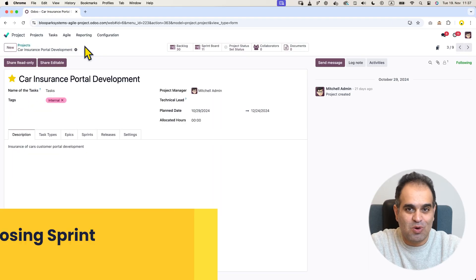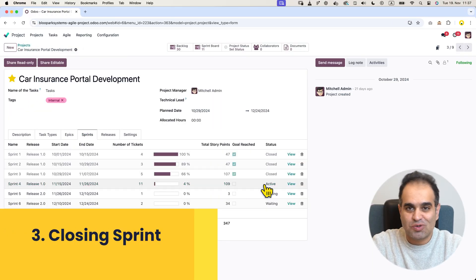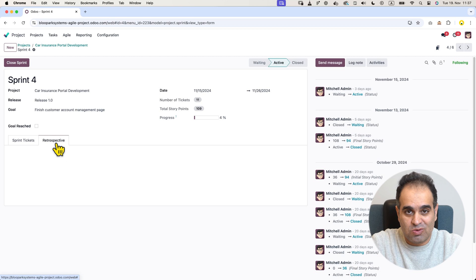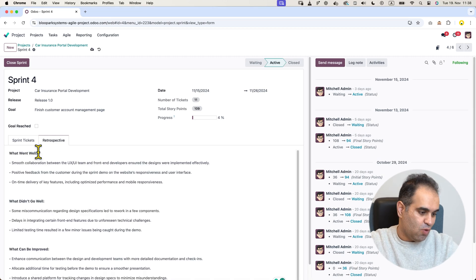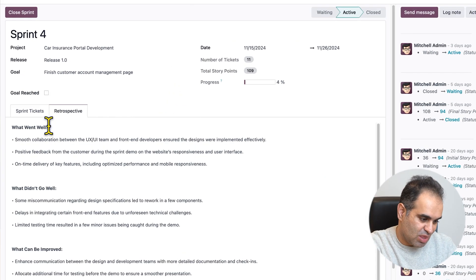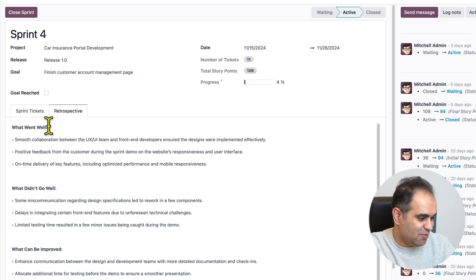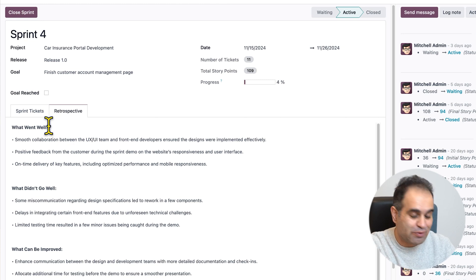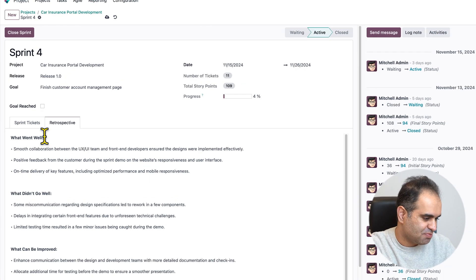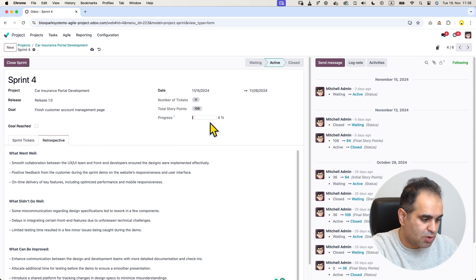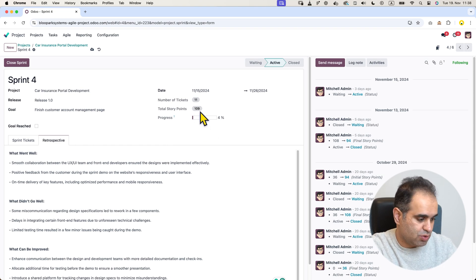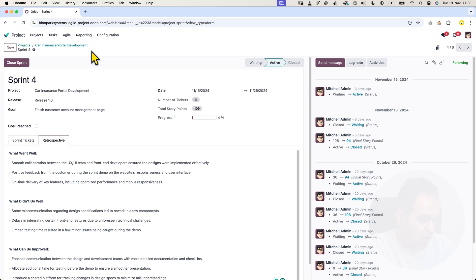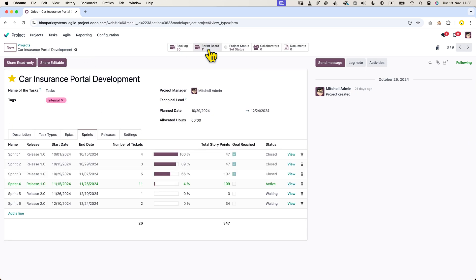After the sprint demo with the customer during the retrospective, we can note down all the key points, what went well, what didn't go well, and what improvements we need to implement for the upcoming sprint. We can also see the progress bar showing how many story points we have completed out of the 109 total story points.